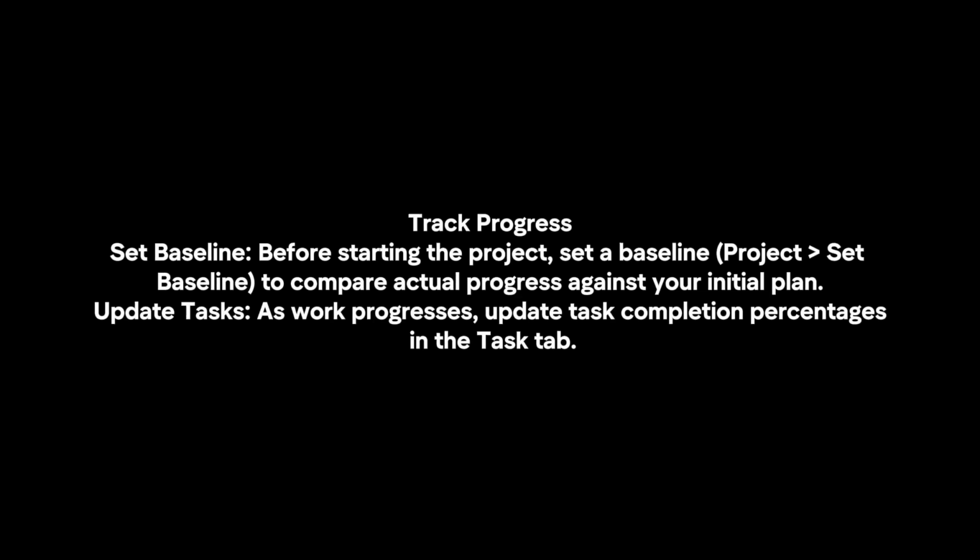Track progress. Set baseline. Before starting the project, set a baseline to compare actual progress against your initial plan. Update tasks. As work progresses, update task completion percentages in the Task tab.